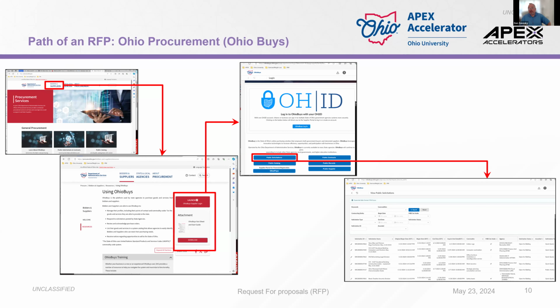How do you propose an alternate product as opposed to what they have requested? Example, if they are referencing a TPO roof and we propose a PVC roof in our bid. You would put that in your project approach or the technical approach, and you would say, we realize that you favor this one product, but in our experience, we found that this product performs at a superior rate and is a little bit cheaper, and that's how you introduce that.